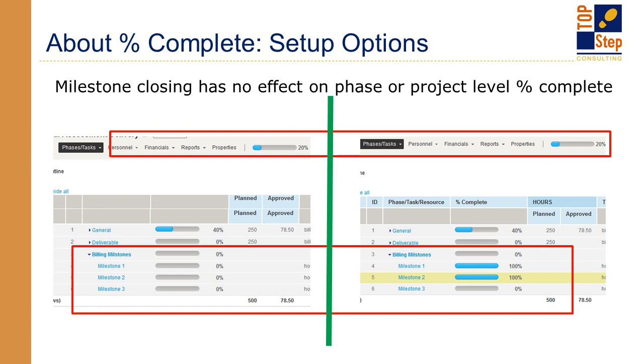value. Here you can see at this project, the one on, well, both really, you can see that this project is at 20% completion based on the fact that we have a 40% completed task and a 0% completed task, and with these first 2 tasks on the left and right. And again, those are the only ones that have planned hours.